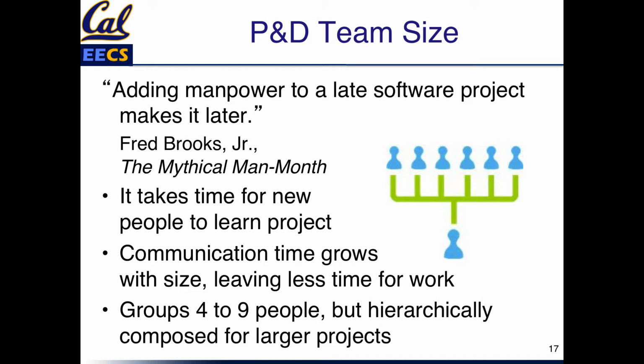And then communication goes up with the number of people in the project. So the bigger the project, the more time you spend communicating, the less time there is for work. So you can scale up to bigger groups, but they tend to keep groups not too big, so that they don't spend too much time in communication, and then you scale it up hierarchically.